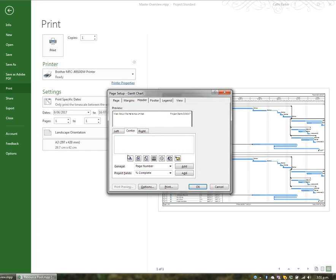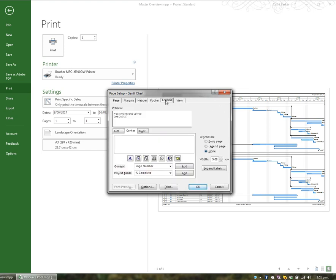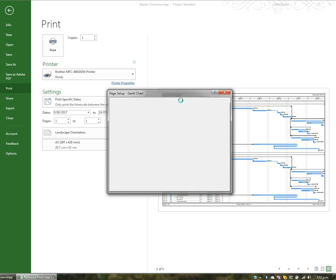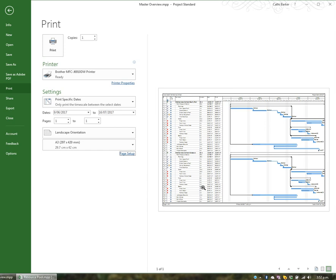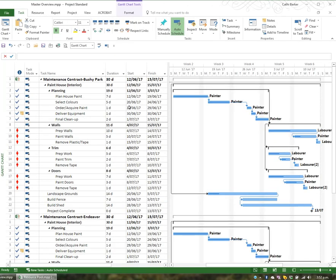Page setup allows you to set up headers and footers. You've also got the legend option we looked at earlier, and a few more settings under view. Under view you can tell it to print all sheet columns — which I don't want to do — or just the first three columns. You can also print any notes if you've added them. I don't want to print blank pages so I'll remove that tick and click OK. At this point you would print however many copies to whichever printer, for whatever date range and how many pages. To exit print preview simply hit the back button.